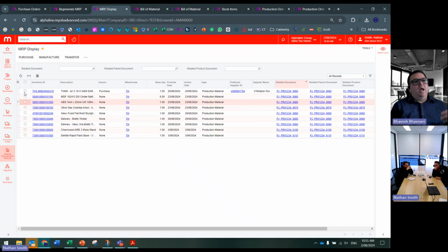Will they generate a different PO based on the promise date? It will create one PO, but every line has a promise date, and every line's promise date will be different. So the suppliers will see that if you are printing it on your PO. If you're not printing the line promise date on the PO, then they will not see it. That's where I think we need a separate PO per promise date. Otherwise, we'll get a third of the goods on the PO.